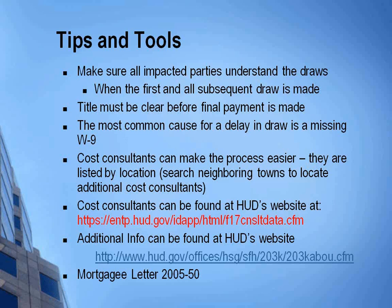If a contractor doesn't understand that and somehow is not able to function under that scenario, they're going to have to either way. So the borrower needs to make sure they choose a contractor that understands that he may be the first person that finishes his work up front, but until all the work's done and the whole project's complete, they don't get the rest of their money. So we've had contractors call us and state that, I finished my job 30, 45 days ago, I need payment. And again, it's when the entire project's completed, inspected, and then we release the final draw.